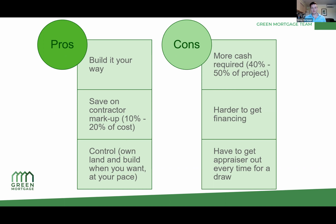Take that to the bank, and the bank says, sorry, you need to be at 40% complete or you don't get your draw. And all of a sudden you have contractors saying, well, I need to get paid, and you're in this really tough spot. It can be very stressful. One of the things that we find is that certain lenders, especially private lenders, are more expensive, but in many cases you actually determine the draw schedule.